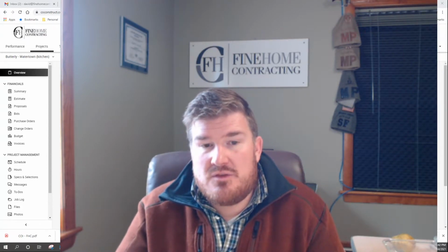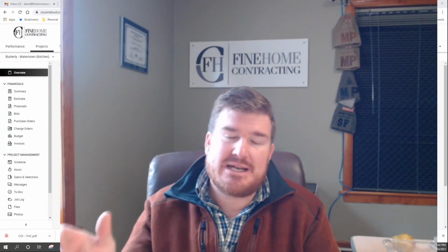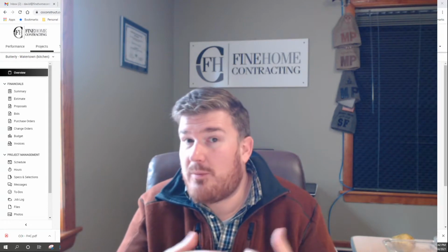when there's the project handoff. So when that salesperson hands you off that project, you're going to want another 30%, 35%. And why do we want that? Well, we always want to be ahead in the jobs. We don't ever want to get behind, meaning we've paid out more money than we've collected. So on cash jobs, we always want to stay ahead. So we always want to pre-invoice and collect the money before the work's done. On the lender finance, that's going to be the opposite, but the whole process is exactly the same for both.